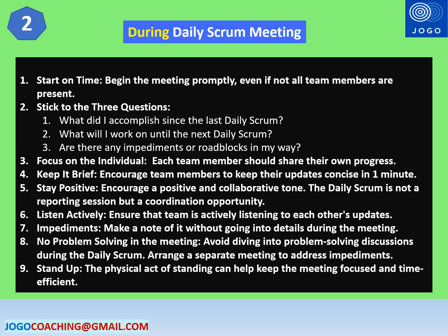Stick to the 3 questions and ask the team members to share the update on these 3 questions only. What did I accomplish since the last daily scrum? What will I work on until the next daily scrum? Are there any impediments or roadblocks in my way?